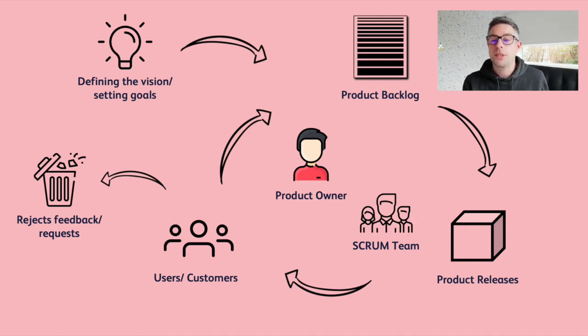So once the team have worked through those user stories and have started to build things and started to get momentum up and starting to really build out the different elements of the product or the feature, then the product owner is responsible for deciding if those activities meet the team's definition of done and ultimately whether that product or that feature can then be released.